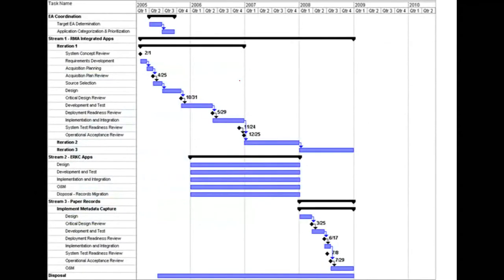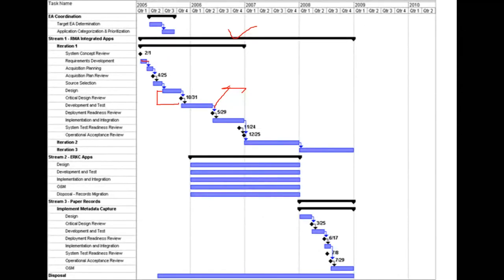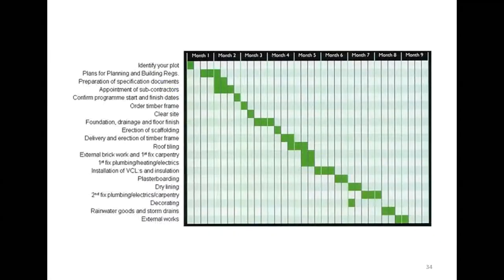This output from a tool like Microsoft Project shows the summary task at the top, providing a macro-level view. Lines demonstrate the duration and relationships between different activities. Most relationships shown are finish-to-start. The direction of the arrow matters — if an arrow originates from the beginning, it's a start-to-start relationship meaning the subsequent activity doesn't need to wait for this one to finish. If the arrow originates from the end, it's a finish-to-start relationship meaning the preceding activity must finish before the following one starts.